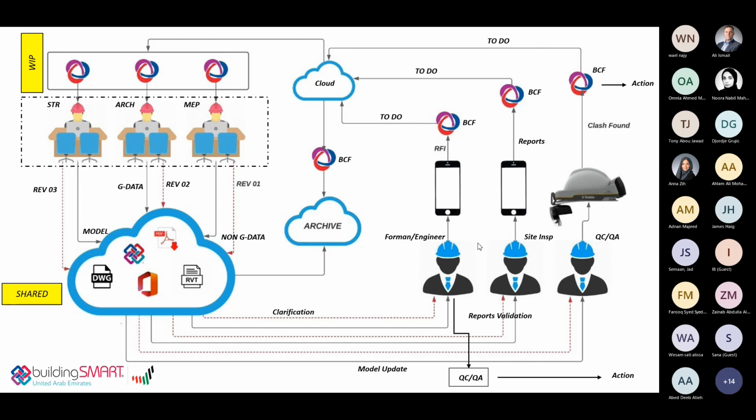So within this workflow setup, one can define the duration of the various approval stages. This enables powerful notification and reporting. Once a file has been uploaded into the workflow, the first respondent is notified via email. So this is very, very useful. You'll be notified the whole time during the project life cycle. If they have not completed their approval within a given time, they are sent a reminder. Once it's completed, for sure you will receive another reminder, and the next recipient is notified and commences review, and so on, and starts to approve it and send it back.